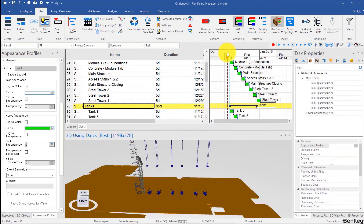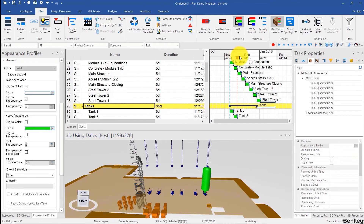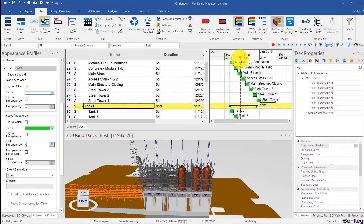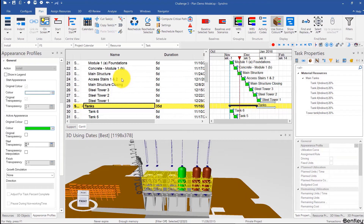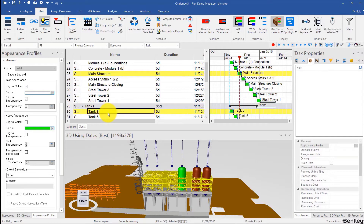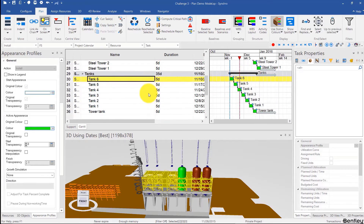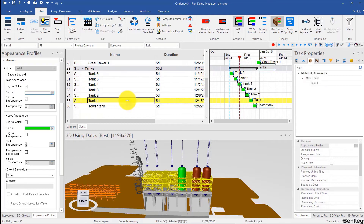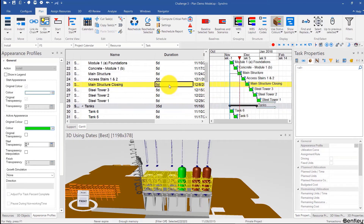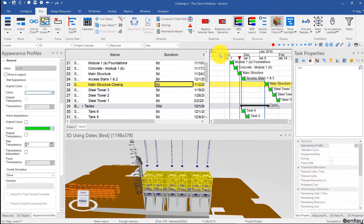For tank six, it's going to have to come after the main structure but before the main structure closing. So we're going to click on main structure, on tank six, Ctrl+L, then we're going to click on tank one, and then main structure closing, Ctrl+L, and then reschedule.